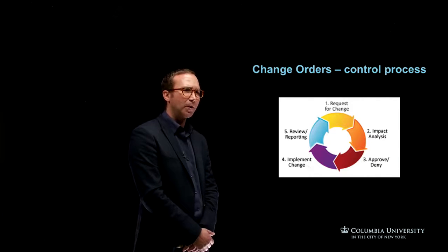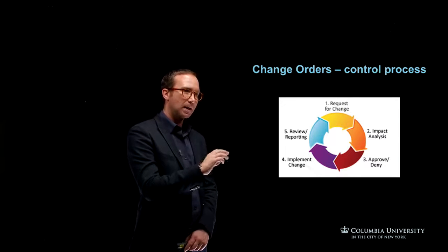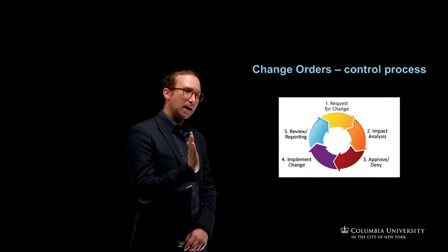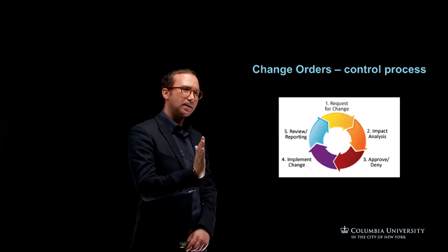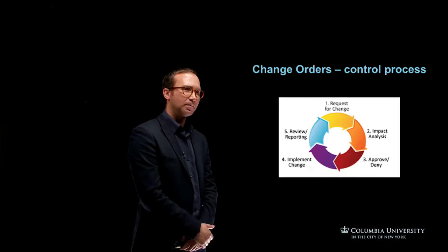Obviously, if it's not approved, it stops there, and that's why it's important you log it on your cost report. It hasn't been approved, they are not due the money, and it's not happening. If it has been approved, the change is implemented, and it goes through, it gets reviewed, and it gets reported further as well.